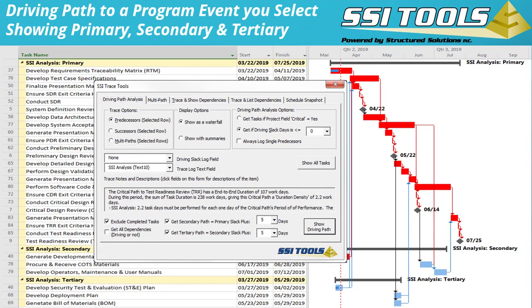To add a secondary and tertiary driving path analysis, you must select the Advanced Trace Tools Form from the Trace Driving Path Task Options. In this example, I've defined the secondary path as tasks having up to five days of schedule flexibility, and tertiary path tasks as those that could be delayed between five and ten days before they would impact the primary analysis. The parameters for secondary and tertiary can be user-defined. This example shows how SSI Analysis Tools can group tasks as primary, secondary, and tertiary drivers. I selected the Test Readiness Review event, which you see at the bottom of the primary task group.